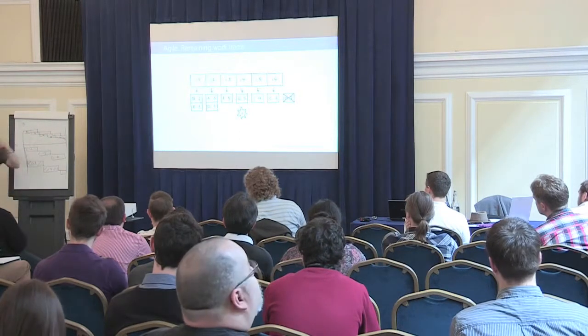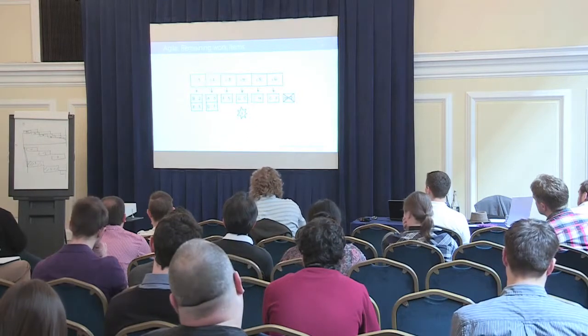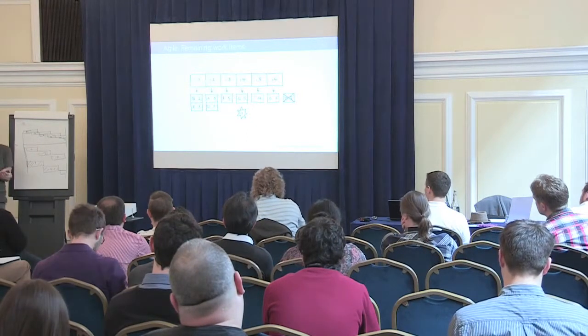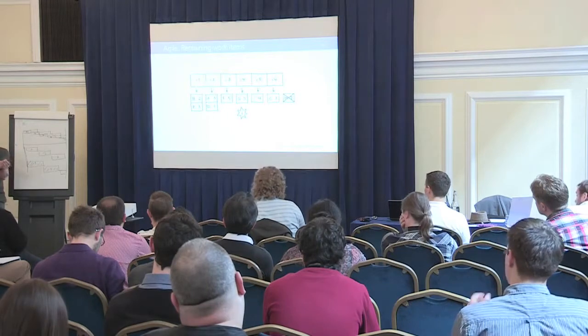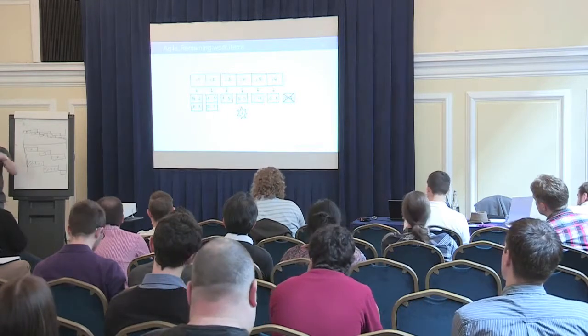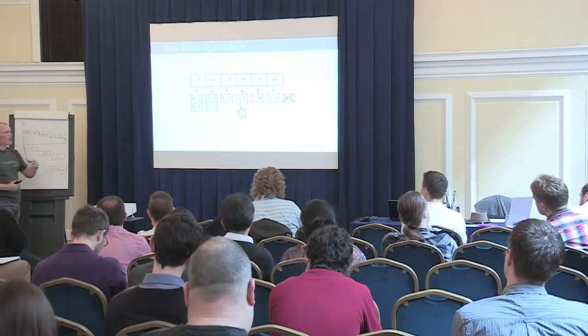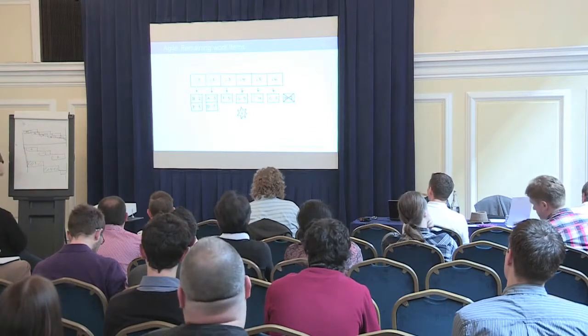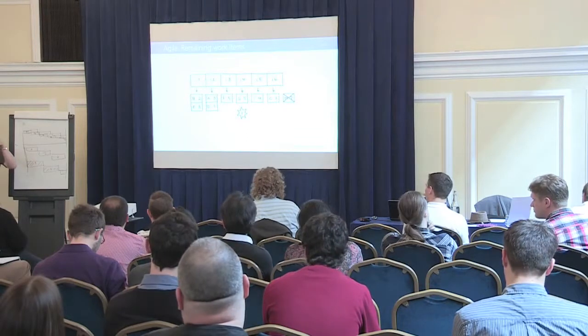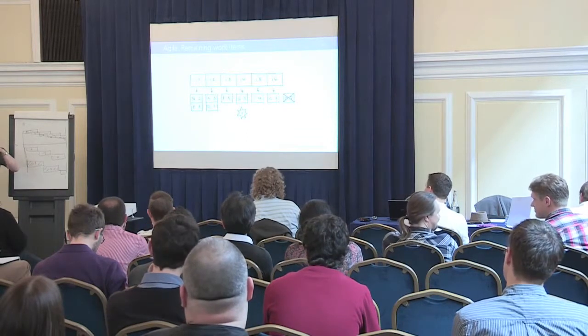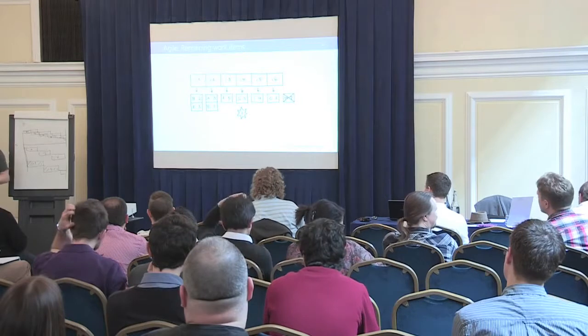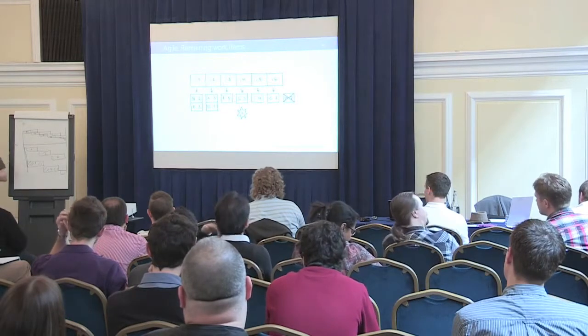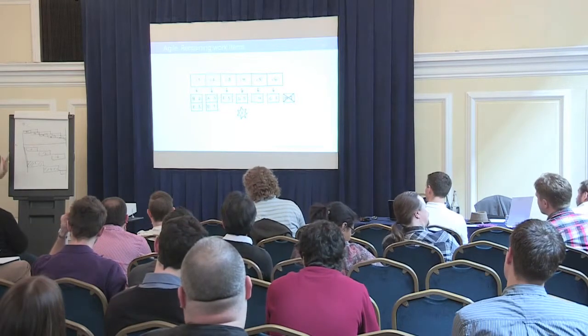For instance, in a long-running project I just told you about, we exactly did it. We estimated the use cases that we used in points on a slightly different point scale than you would probably do with user stories, but I'll get to that hopefully later on. And we actually were able to, after a year, we exactly knew how much money it costs to implement a single point. And it was 937 euros. So that's quite an exact figure, right?